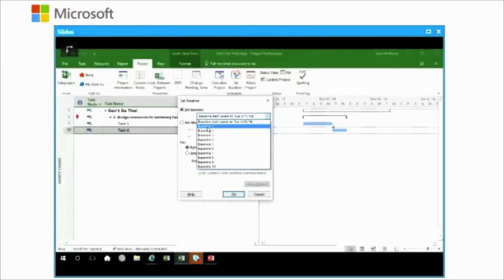So if you're going to drive and level your project using priority, then every high priority task will need to be manually adjusted to be something higher than 500. For those tasks that can be delayed indefinitely, even if you want to delay them a long way, you could use a lower priority. Using that concept, if you're told, hey, your task is priority number 1 in Project, that doesn't mean it's super high priority.